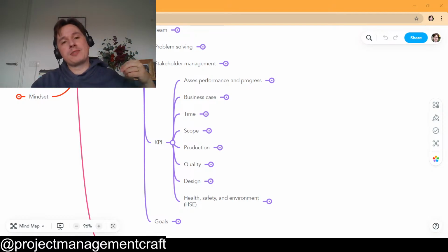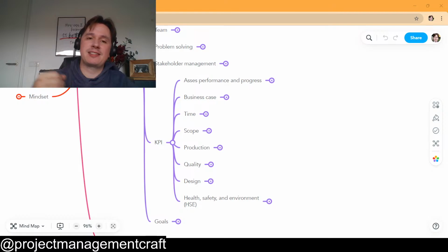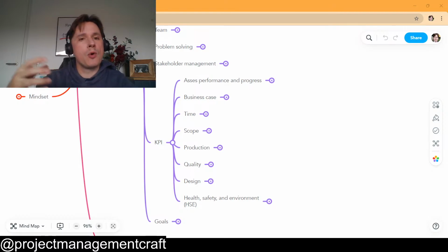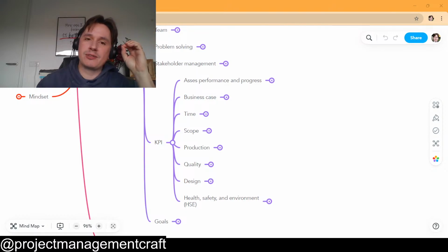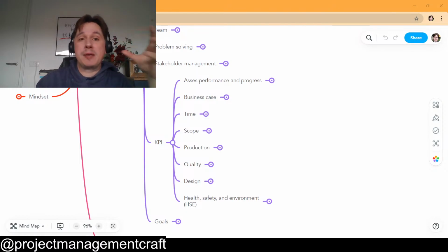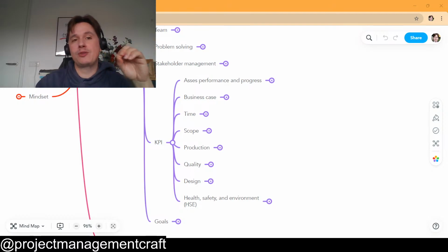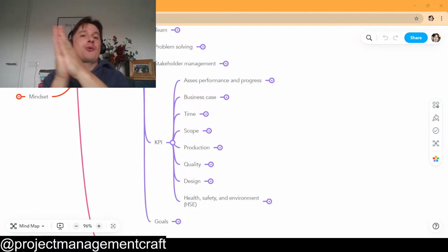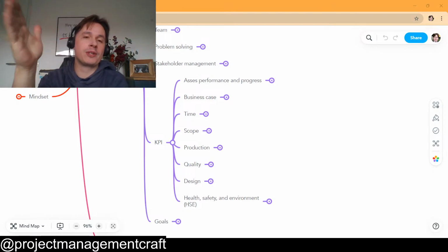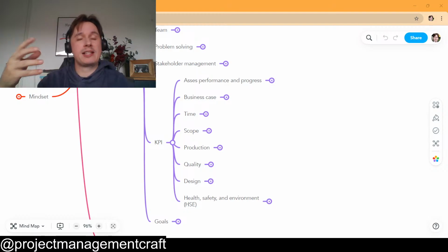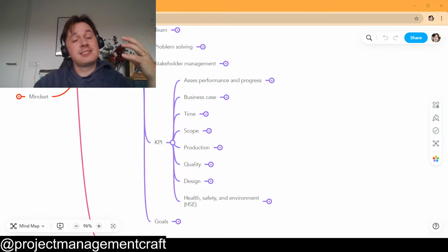So the key performance indicators, in the same example as the book or the drawing, will help you to understand how you progress. What happens in a lot of organizations? They set key performance indicators in a wrong way, as I just mentioned in the case of the engineering team. A key performance indicator should indicate how the performance is going. If your KPI is green, that should mean that you are going in the right direction, that your progress is at the right speed, with the right quality, this kind of stuff. But in this case, it was not.